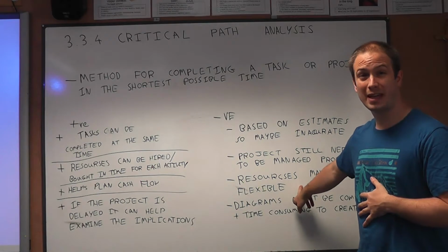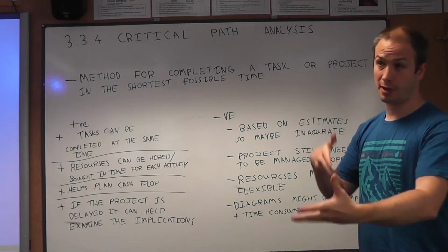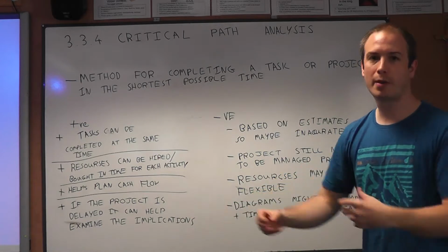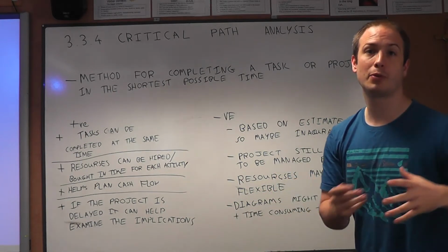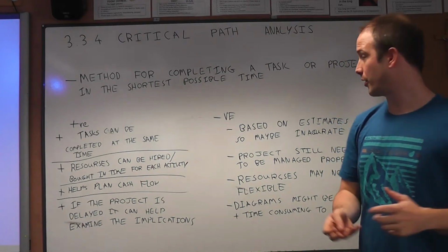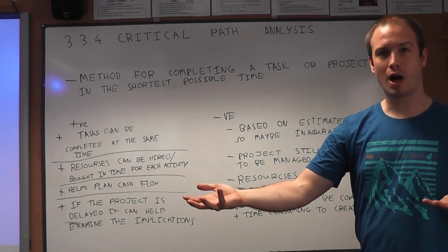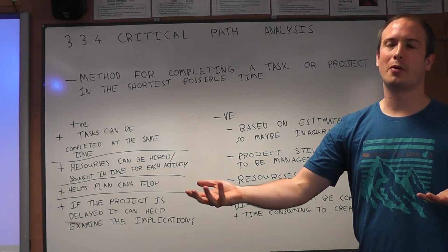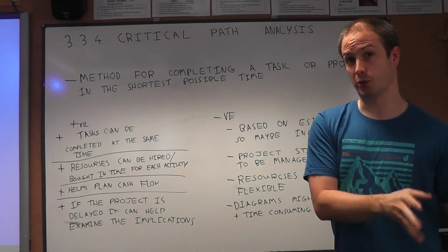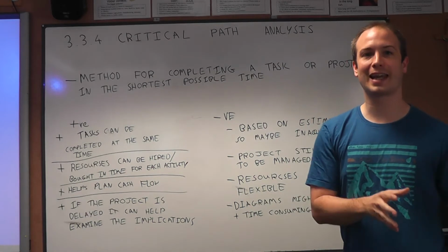Also, resources may not be flexible. I suppose there would be some contractors, but you would have people who are in for laying the pitch, and they may not have the necessary tools and experience to be putting up scaffolding or installing seats. So although those tasks may be completed at different times, you might not be able to move those resources over so that resources can be allocated effectively.